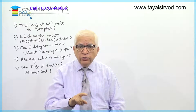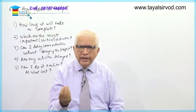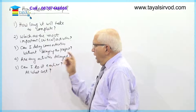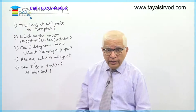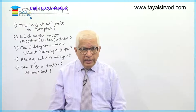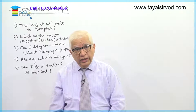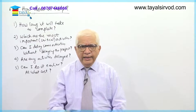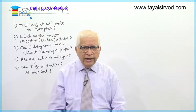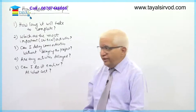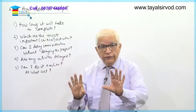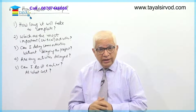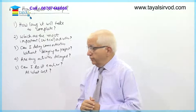Non-critical activities are those which I can afford to delay — a delay there won't hurt as much as a delay in critical activities. Another question: are any activities lagging behind schedule during implementation? If they are critical, I must be concerned because a delay in critical activities delays the project. If the delay is in non-critical activities, the project can still be completed on time. Can I shift resources from other activities to get back on track?